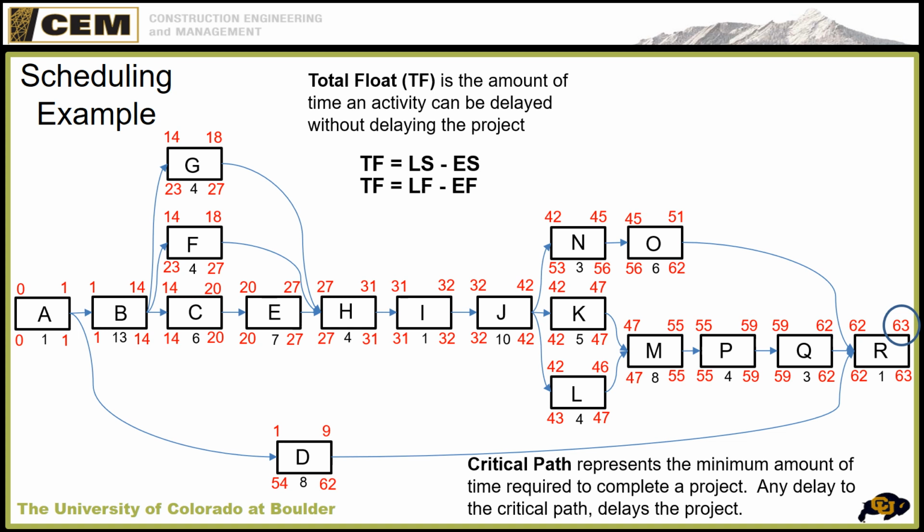So you start to really manage anything on the critical path or anything that has low float, because L, for example, has low float. If I ignore L, it becomes critical path in a heartbeat. So if I delay this 2 days, it's now critical path, or 1 day is critical path. So 1 day of float is something I would manage quite closely.